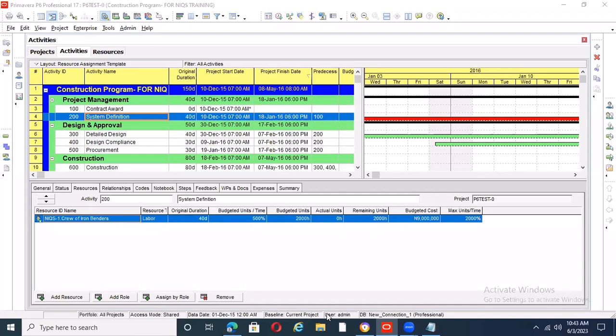There's something we call split currency. Split currency means you have your contract in US dollar or in euro, and you have split currency. They can tell you, we're paying 60%, because especially IOCs, most of these foreign companies like Julius Berger of this world, they usually don't pay in Naira. So they will insist that they want to be paid in split currency. You pay me 70% in euro or in dollars, and you pay me 30% of that contract sum in Naira.